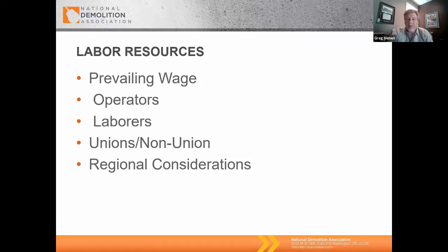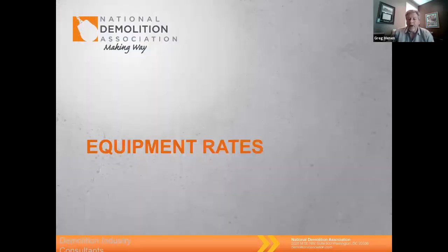So these are the things we kind of talk about, and the regional considerations, and getting into what those requirements are, and making sure that as an estimator, you're not simply just using the rates that are standardized for your local work. I'm going to go back just really quick here too. The other thing we like to try and get into and discuss is what are those requirements for, say, per diem, hotel, travel, what's the travel time, and going through these things. Equipment rates.